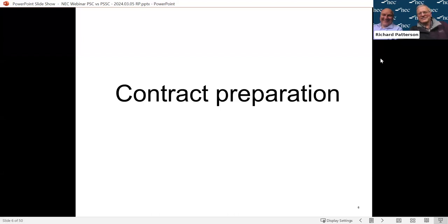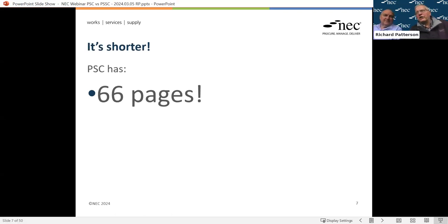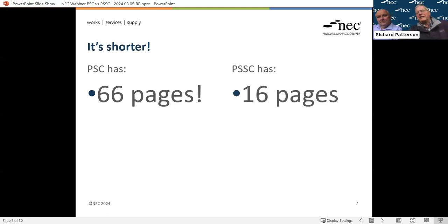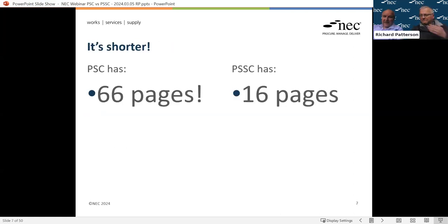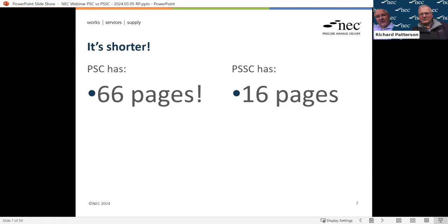We've split this session into contract preparation and then contract management. Starting with putting it together - firstly it's a lot shorter. The full PSC has got no less than 66 pages, but the Professional Services Short Contract has only 16 pages. What it highlights is that you've almost got down to the essentials of a basic contract, and as we go through each section you'll see that if you want something a little more than just an absolute basic, you'll need to add a bit more in.